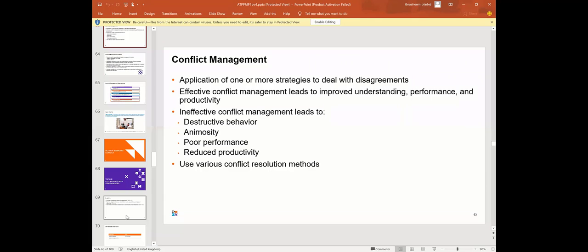So in scenarios where the plumber does not fill it back with mortar, and it's the responsibility of the mason, and the problem is not resolved, and the role is not assigned to one person or the other, the conflict will keep on happening because there will be other points in time where the same thing happens again, and then the same issue will come up to escalate or it will spoil the work. Okay.